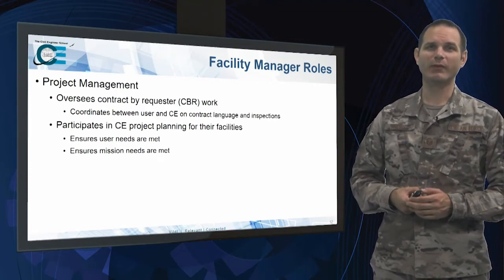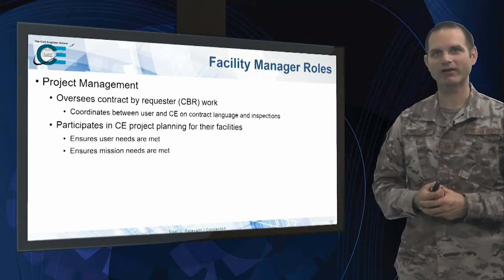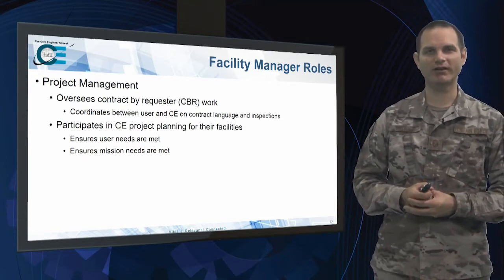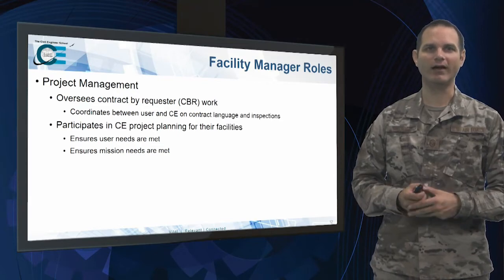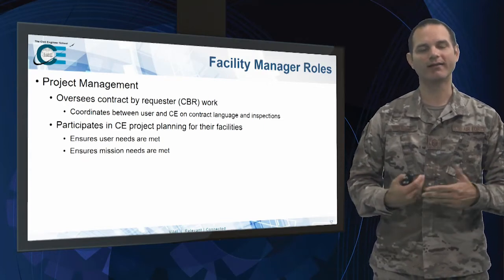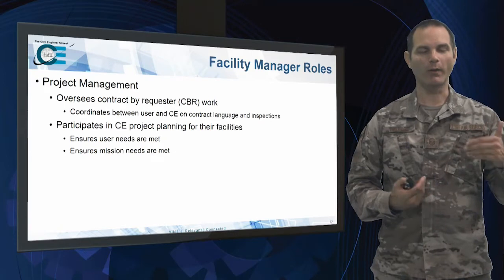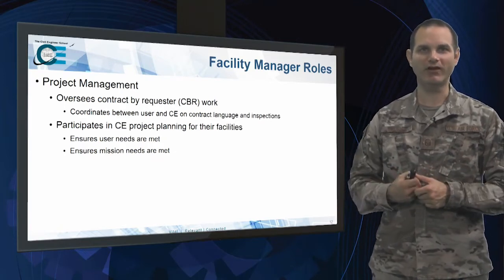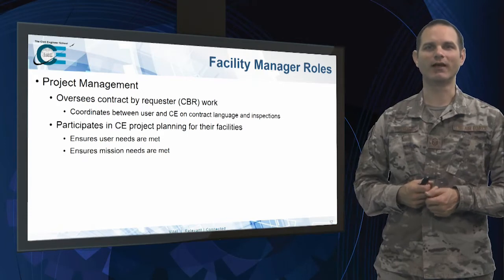They're also going to be participating in CE project planning. So we're looking at our larger scope projects, our facility projects, our capital projects, our opportunities. Facility managers are going to need to be involved with that. We need to make sure that their user needs are met. So that's why we want to have the facility managers in those meetings. We want to make sure that what we are planning and designing is actually going to be functional for the user. And then we also want to make sure that the mission needs are met as well.